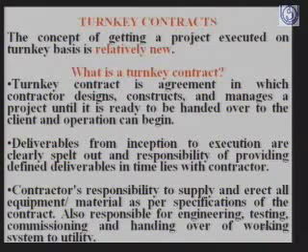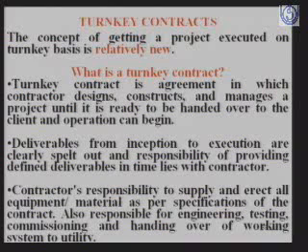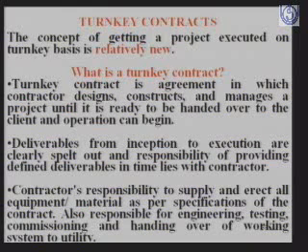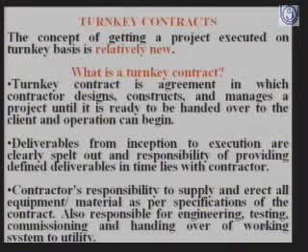You have to simply go, take up the key from him and start the project. So your responsibility is only to have control over it. Now we see how we control it. The deliveries from inception to execution are clearly spelled out, and the responsibility of providing defined deliverables in time lies with the contractor. The contractor is responsible to supply and erect all equipment and material as per the specifications of the contract. He is also responsible for engineering, testing, commissioning and handing over the working plant to the client.